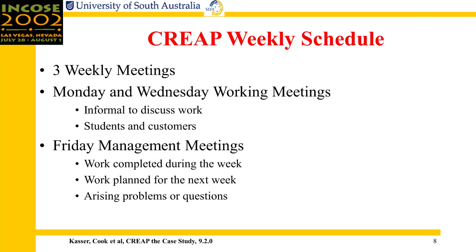The weekly schedule included three meetings. The students would be working full time on the project. We would get together Mondays and Wednesdays to have working meetings — a chance for the students to discuss what they'd done with the customers, namely myself and Stephen Cook, and to discuss how to do the work and some of the problems with management, namely Stephen Cook and myself. On Fridays, we would have weekly management meetings that covered work completed during the week, work planned for the next week, and arising problems or questions. And every now and again, according to the schedule, there would be a milestone review.